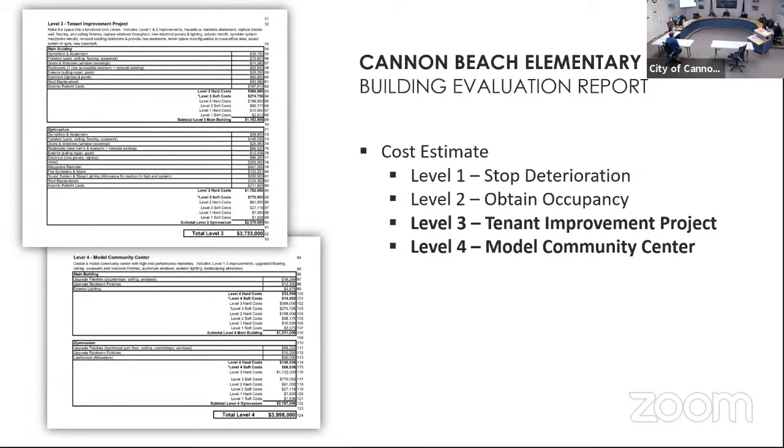If you made them two separate buildings, I mean, it doesn't really matter what the occupancies are. You can have two different occupancies. The problem is probably the proximity of the buildings, so you're still having to have that fire barrier separating them. The alternative to that fire barrier is sprinklering the whole thing. Right. And then it kind of creates one building and you don't have to worry about separation. Okay, I'm just curious. Thanks.